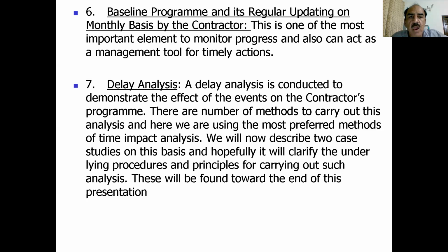Now, the seventh element of the extension of time claim is delay analysis. A delay analysis is conducted to demonstrate the effect of the events on the contractor's program. There are a number of methods to carry out this analysis, and here we are using the most preferred method of time impact analysis, that is, how this particular event has caused the delay of the project.